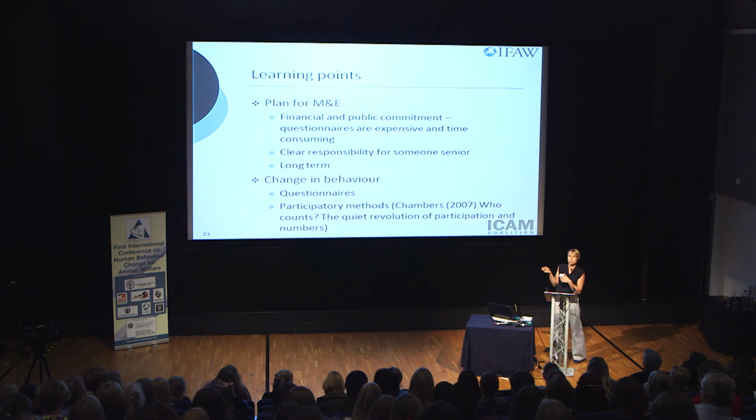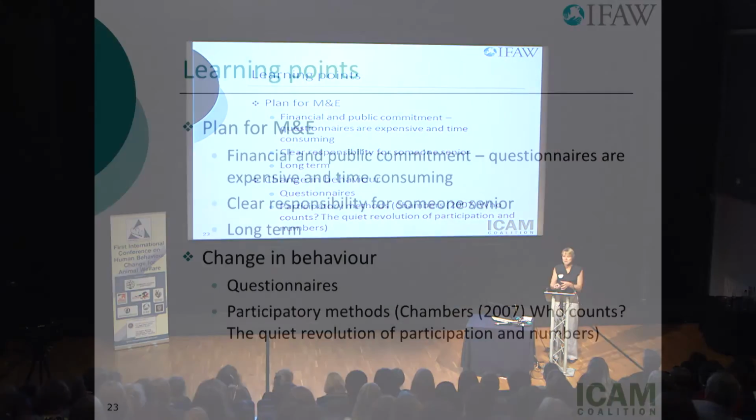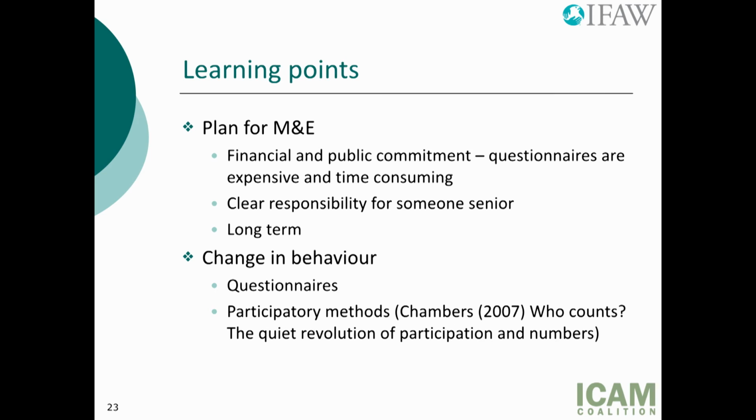I would recommend that you make monitoring and evaluation a very clear responsibility of somebody senior. It's such an easy job to drop off the to-do list, so you want to make sure that it's up there somewhere. And we really need to make this long term. So if we talk about having a financial commitment to monitoring and evaluation, that should last after the intervention has completed. If we're talking about sustained behaviour change, ideally we want to be going back years after we've left to see if it's still in place. And I think you would have heard that Jeff mentioned earlier today sort of intergenerational change. So we're talking potentially about really quite long-term change.